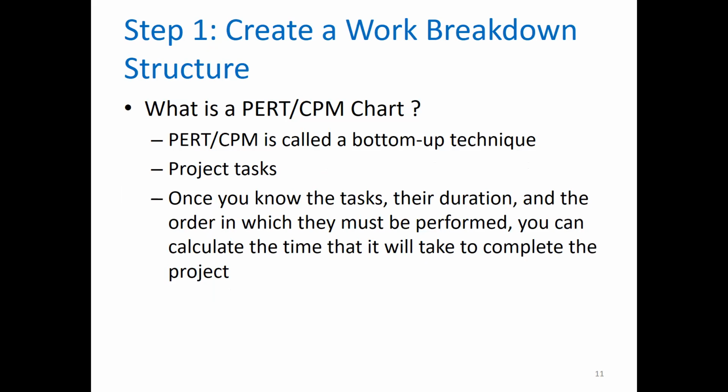Now, a PERT or a CPM chart is also called a bottom-up technique. It involves project tasks, and once you know the tasks, their duration, and the order in which they must be performed, you can calculate the time that it will take to complete the project. Like mentioned earlier, we'll get more familiar with PERT and CPM charts in weeks to come.